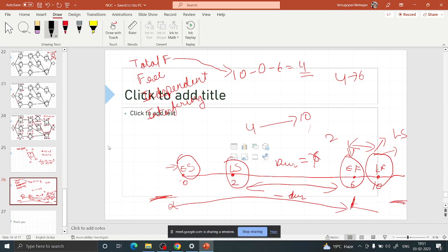You fixed one project finish and came backwards from there. So in early finish you didn't take care of any succeeding activities, right? You gave them all the freedom. Similarly, when you calculate free float only considering early finish, you are giving the succeeding activities all the freedom to do whatever they want. In this activity, we can manage.